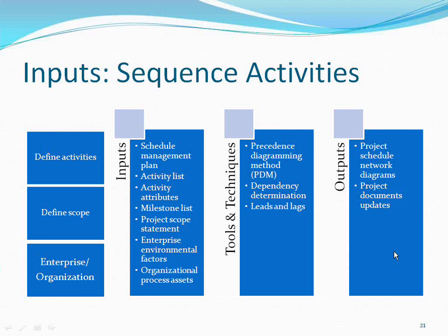After finishing the design, you will start the successor activity called testing. You need not wait for the entire design to be finished. If 20% or 50% of the design is finished, you can start. It means in parallel, in advance, you do it. So though activity A takes 6 days, you can start testing on the 5th day itself.